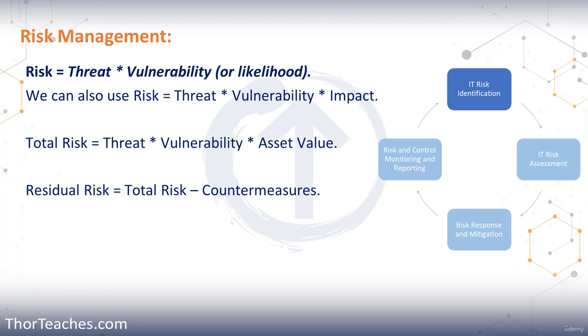For the exam, do you need to know all this? Probably. I would. I think it's an integral enough part of risk management that they may give you 1 or 2 questions on this. Then we have the total risk. That's the risk times vulnerability times the asset value. And whenever we do mitigations, the residual risk is the total risk minus the countermeasures.